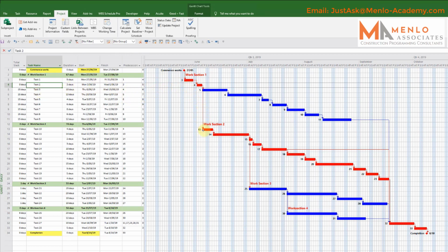It leads into this task. So between this and this, there is no slack, and the chain runs through here. Now, this task starts immediately afterwards, but as the chain of work runs down, it finishes here. So it finishes short of this chain of work, and the amount of slack, this 15 days, is actually the amount of slack showing here. There's 15 days before it then affects the next task in its relationship, and there's a 15 day gap because this is being pushed out to this point by this chain of work.